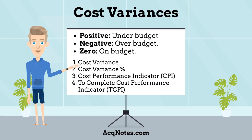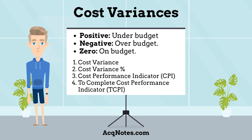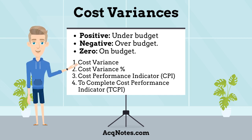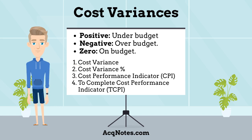There are three cost variance outcomes in earned value management. A positive result means a project is under budget. A negative result means a project is over budget. And a zero result means a project is on budget.